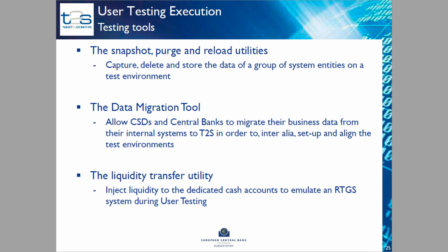At the same time, mainly the central bank systems, I'm referring now here to TARGET2, but also potentially any other central bank, once deciding to bring their currency to T2S, they have only one test environment. So in order to ensure that, on the other three test environments at T2S, there is still liquidity injected at a certain time at the beginning of the day to the test environment in order to execute certain kinds of test cases, if there is a need for cash.